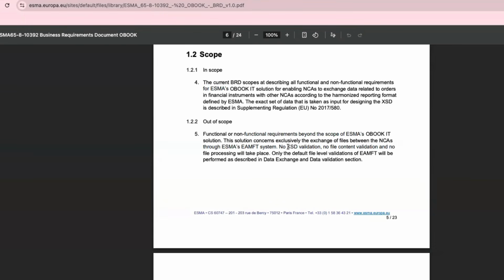So you just explain that, yes, I understand you have additional requirements, and there is a process we follow within our IT team. You have to submit a new intake request. I'll share the link in the chat. Please update your new requirements in that particular Jira story. And then once it is done, our scrum master and product owner will get back to you in a couple of days with the new timelines, with the new funding and everything. Our team will get back to you. That's how you're going to end the call.